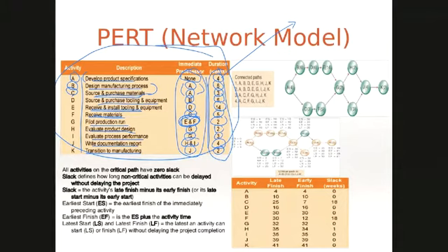So you could have resource one, let's say resource one, resource two. And if you say, we're going to need resource 1 and 2 for 4 weeks, you know how much resource 1 costs for each week, you know how much resource 2 costs for 1 week or 4 weeks, and you can immediately calculate that.